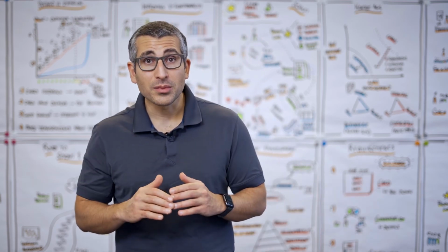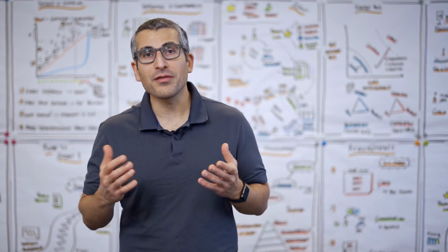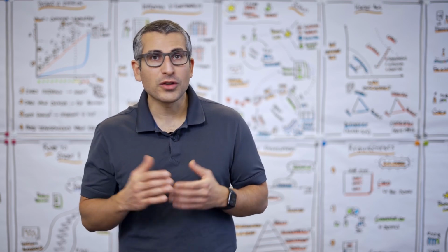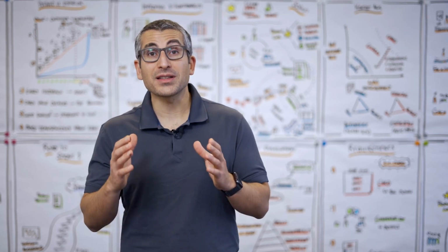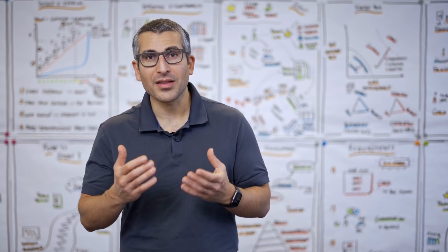The requirements that end up at the top should be very small and very granular, because a team should be able to select them into their next sprint. The items at the bottom can be still very vague. They can be cloudy. We don't need to have that level of detail, so we can also save the time which it takes to create that level of detail.